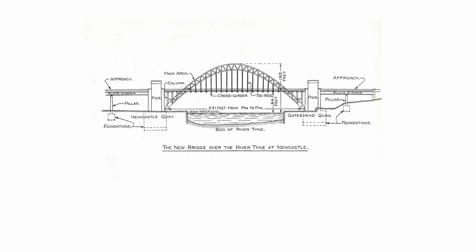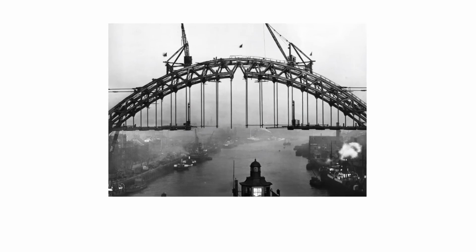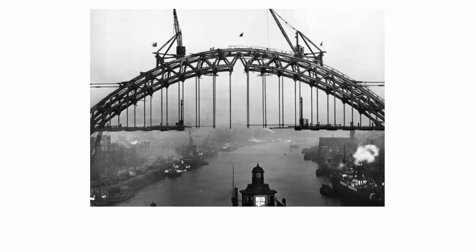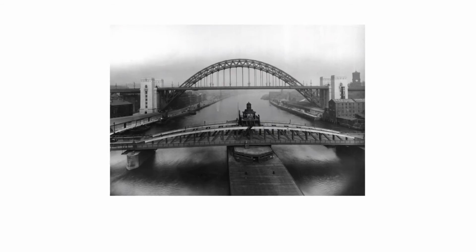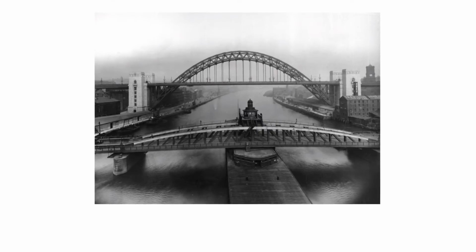Think about building a bridge. At a certain point, half of the bridge is there, 3/4 of the bridge is there, 7/8 of the bridge is there, and still no value has been delivered to the customer. Only when the bridge is complete does the customer receive some value, at the point when they can actually turn up in a car and drive across the bridge.